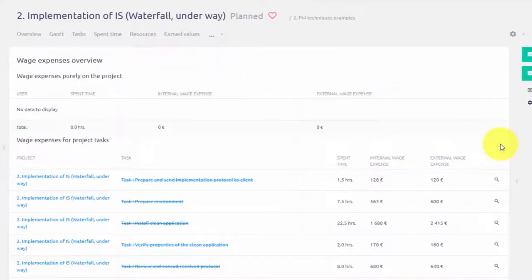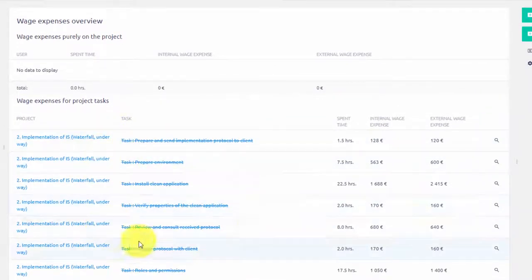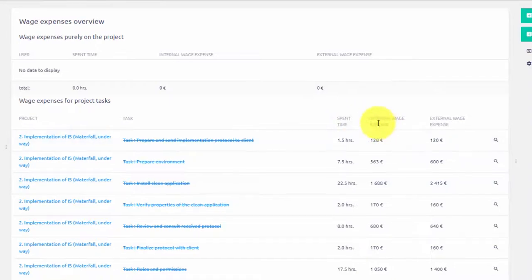By clicking over here we can see a full report which shows spent time entries and internal and external wage expense based on those hours.